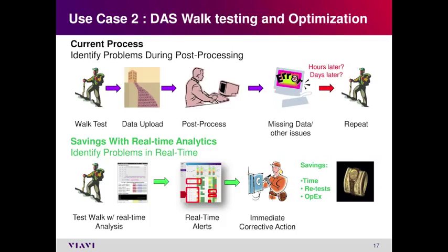This helps you take immediate corrective actions, because usually the construction crew is at the site when the engineers are walking, and you can ask them to fix it if there is something wrong with the antenna, a misplacement of an antenna, or anything like that. So overall, it saves time, and it saves time for the consulting companies, the contracting companies, as well as the service providers. If you think about it, they don't have to resend anybody there, so it reduces their cost and time as well.